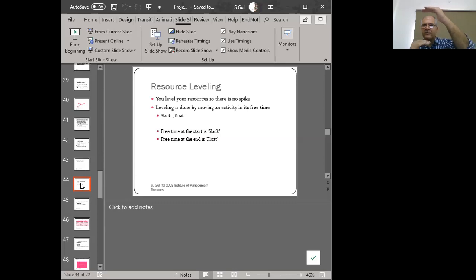They're only doing 10 hours of work, I'm doing 80 hours of work. So leveling means that we both get 45 hours of work, or I get 40 and he gets maybe 50, or some close enough balance should be there, right? So we should be leveling these activities.